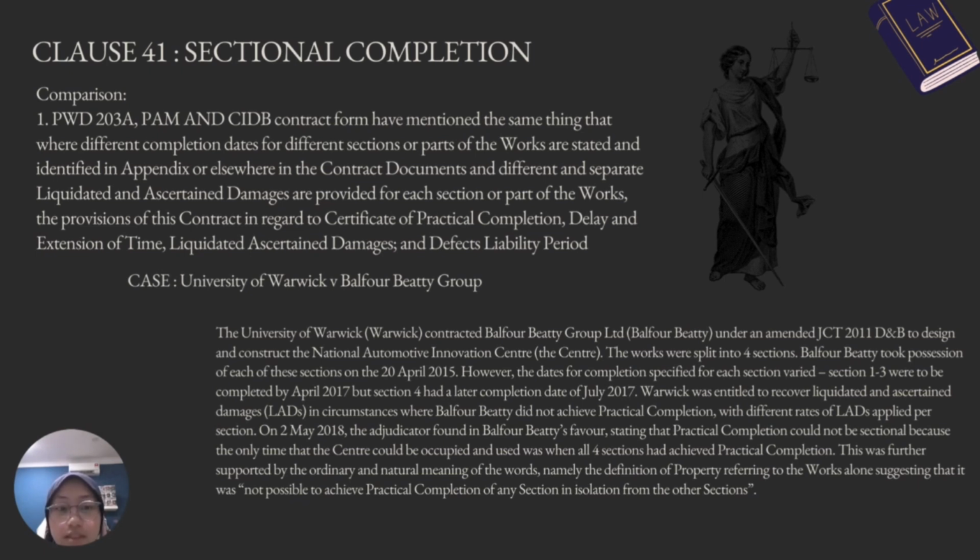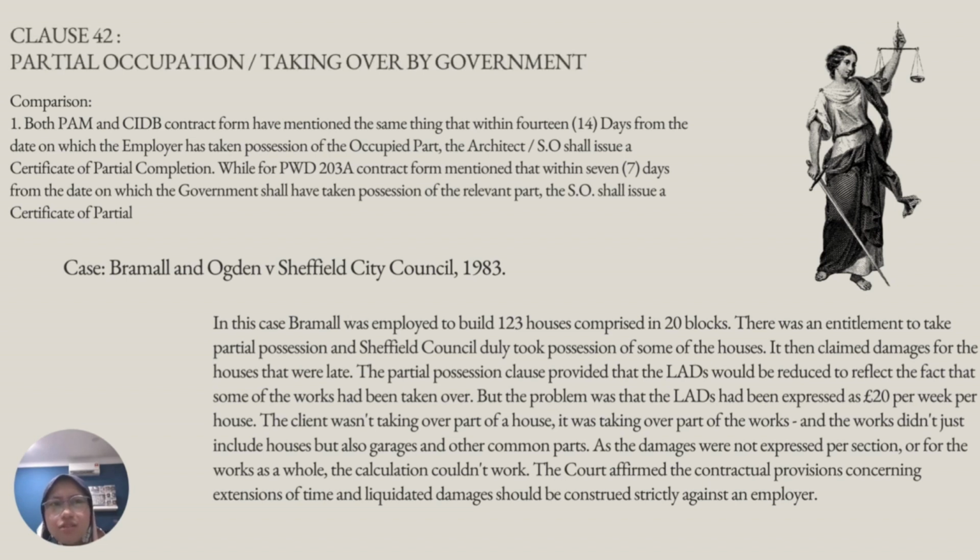This was further supported by the ordinary and natural meaning of the words, namely the definition of property referring to the work alone, suggesting that it was not possible to achieve practical completion of any section in isolation from the other sections.